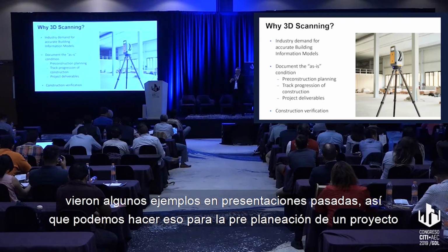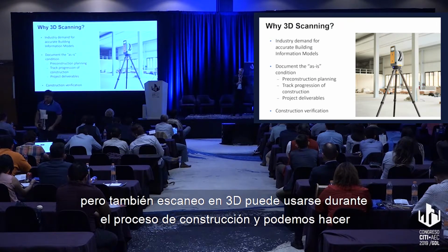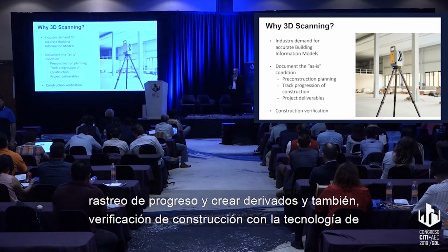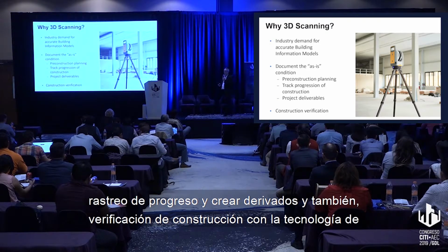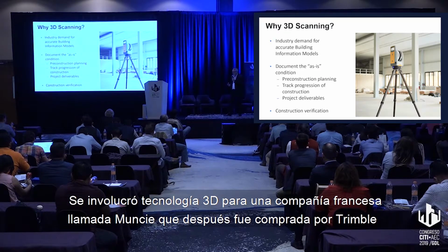So we can then do that for the pre-planning of the project. But also, 3D scanning can be used during the process of construction. We can do tracking of progress, and we can actually create deliverables, and we can also do construction verification with 3D scanning technology today.